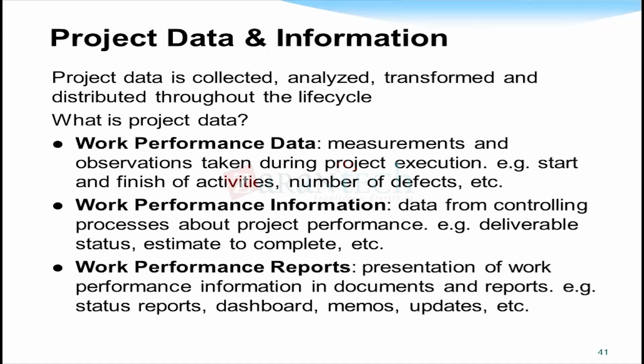So who has to track the risk? Project-related risk, the project manager has to manage. Risk management related to time. But the BA will be taking only the requirement-related risk; only for requirement-related risk will the BA answer the questions. For project-related risk, the project manager will respond. The project manager focuses only on time and cost, and the quality manager focuses on quality, like that. Work performance information is like deliverable status: how much work is done, how much effort is spent, schedule slippage, effort slippage. All these you are analyzing.